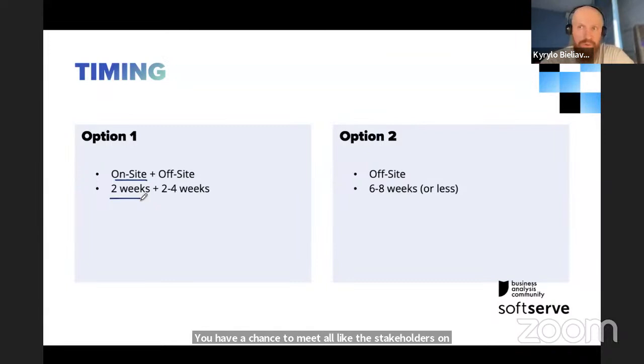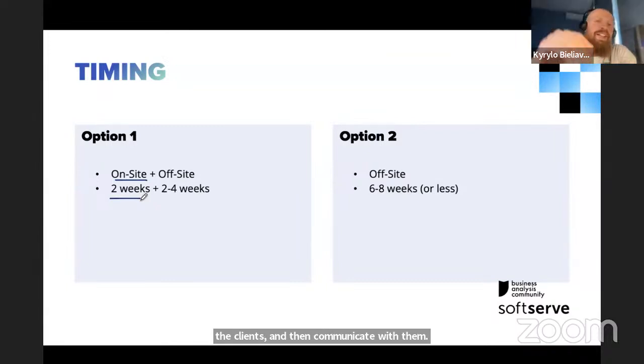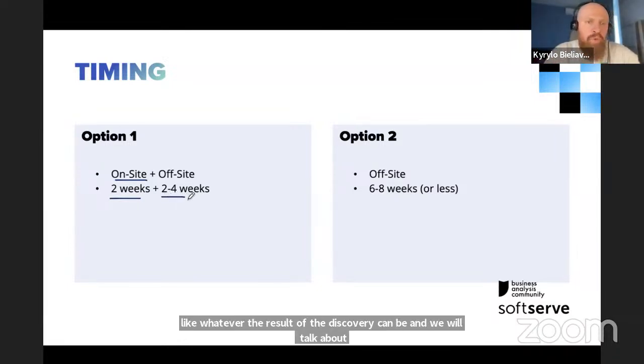So it's a very, very useful approach, I would say, if you have a chance to travel, which unfortunately some of us cannot do at this point. And then you have off-site time to continue working on the artifacts or on the information that you have brought from the on-site, and develop a proposal or an estimate, or whatever the result of the discovery can be. And we will talk about that. So you see it's 2 to 4 weeks.